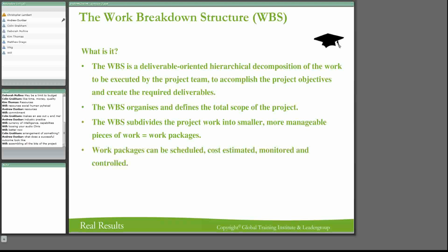And then these work packages, if you like, can be scheduled. We want to get it to the point where it's easy to schedule, the cost estimate can be accurate, it's easy to monitor, and it's easy to control. If I take this piece of work, I can say this is a good percentage done. I can break it down into 20% done, 40% done, 50% done, 80% done, and you can see it. So you can actually manage that, and you can see, if this work package is small enough for us to manage, what is the impact going to be on the big project?